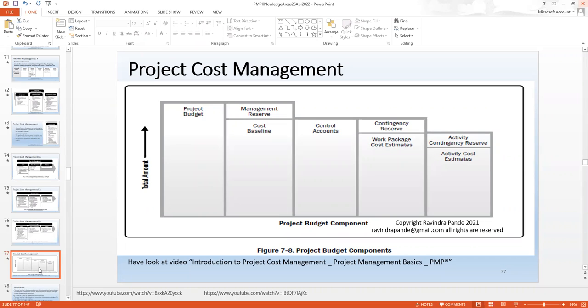These are the activity costs for the exact activities you have planned in Microsoft Project. So whenever I plan, I need to install full biometric at so and so offices. These activity costs must be within the range allowed to me by this activity cost estimate. The others are all reserved. And even for these activity cost estimates, I need to sit with the financial controller to get them approved for my project. Rather than approved, I need to get his or her agreement to make sure I'm following the company's quality policy in terms of my financial cost budget management. And that's how I do it for each and every organization.